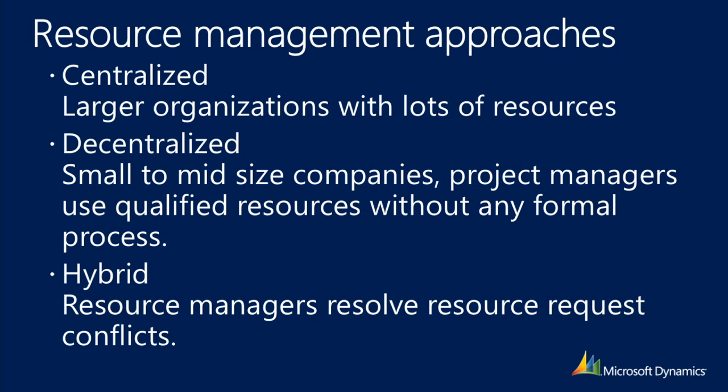We find the decentralized model, in which you're free to grab any resource as long as they are available and they are qualified for the project that you want. And we have also found the hybrid model, in which both of them are in place. So you do have resource managers, and you let people book resources as they want. But if there is a conflict and the same resource is requested by multiple projects, or there is nobody available, you reach out to a resource manager, and resource managers will satisfy the demand on your behalf.